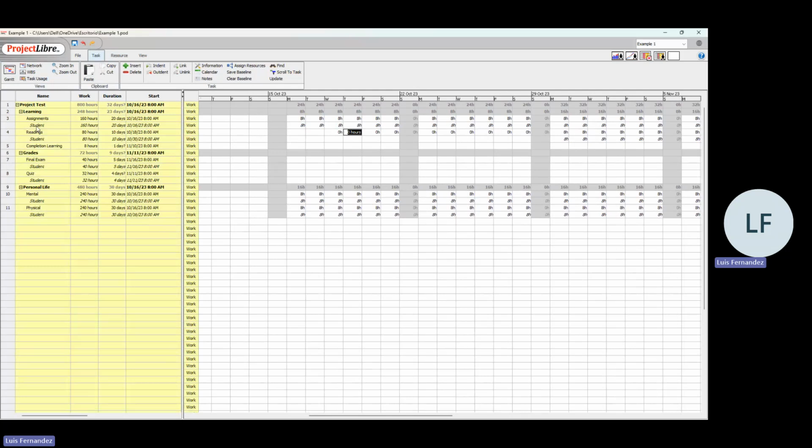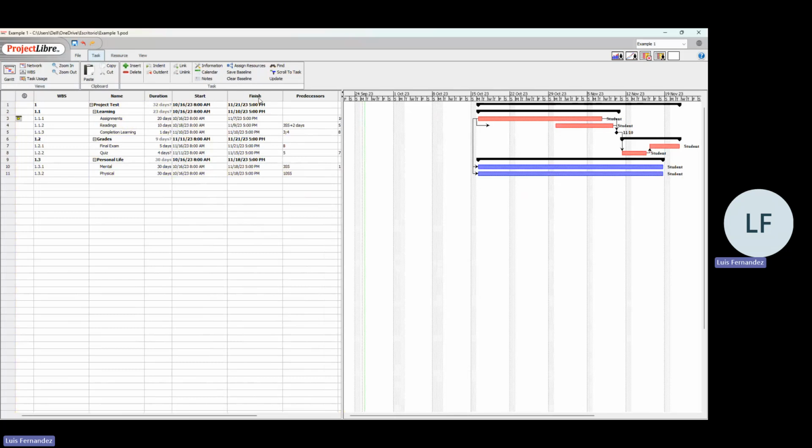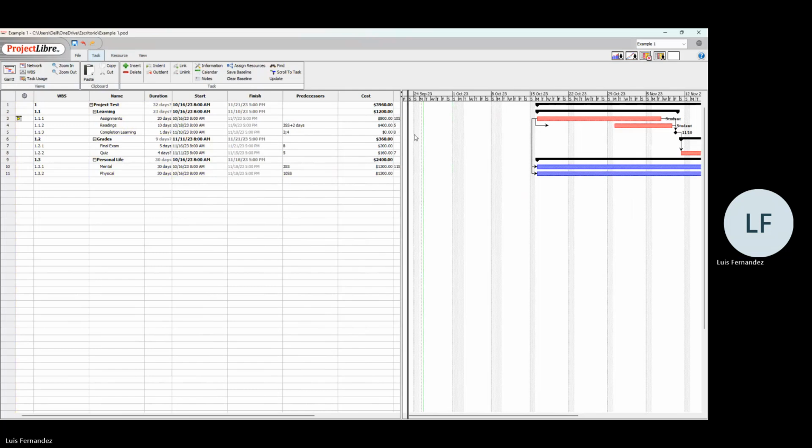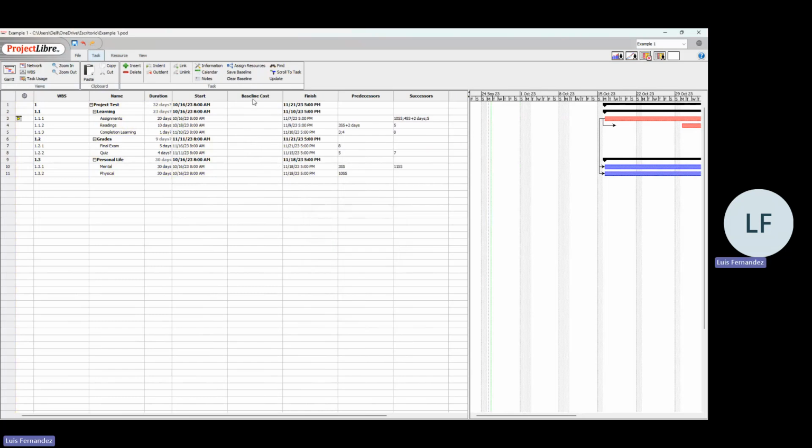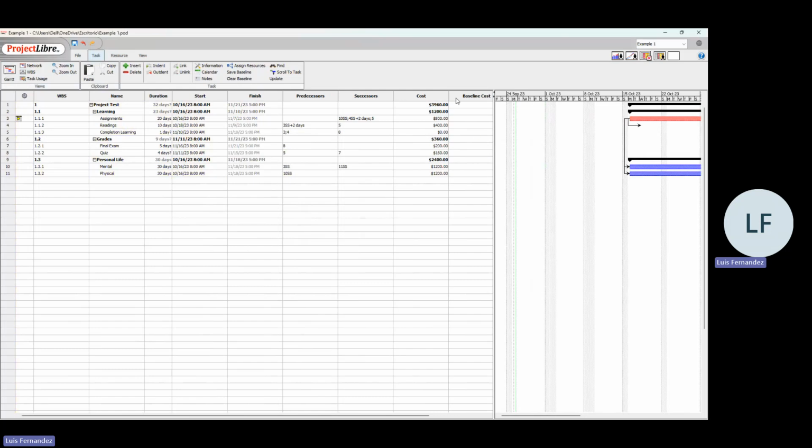You want to see task versus resources. So I was saying, if you want to see the cost, these are columns. And now you have the cost. Let's drag and drop the column a little bit, you select it. And now you have the cost per activity. Additionally, you can see the baseline that we set in our previous case, baseline cost. And we can set it now with the cost we have attached. And also the baseline finish in time, the first that we set.